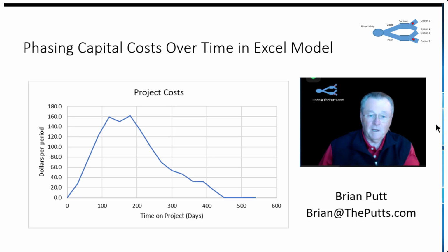Quite often, I'll admit, adjusting the schedule is difficult. But it's important to include the cost uncertainty that comes out of your CSRA. So we'll show the complete analysis and you can do whatever is appropriate for you. And the objective here is to come up with the project cost spread out over time, as shown on this graphic.